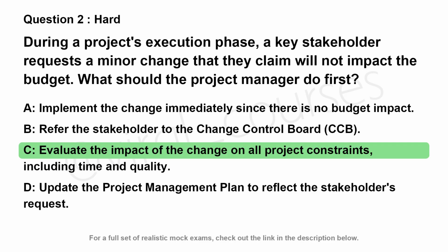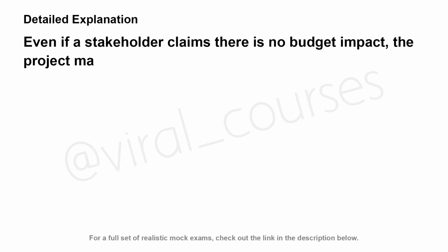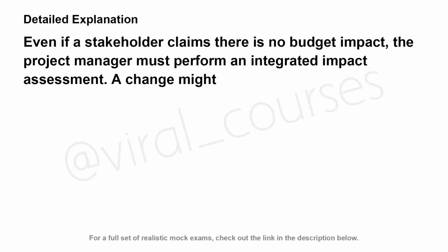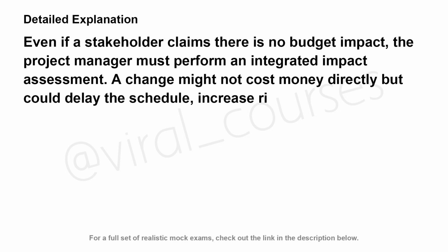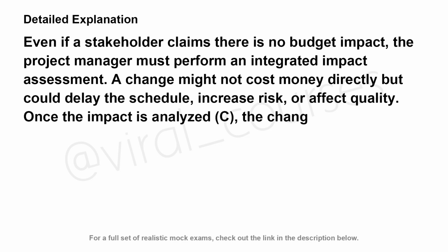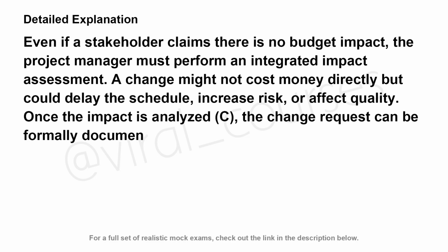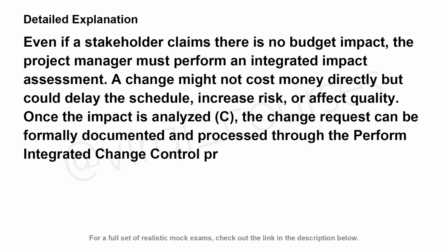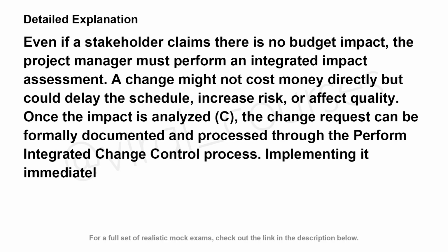The correct answer is C. Even if a stakeholder claims there is no budget impact, the project manager must perform an integrated impact assessment. A change might not cost money directly but could delay the schedule, increase risk, or affect quality. Once the impact is analyzed, the change request can be formally documented and processed through the Perform Integrated Change Control process. Implementing it immediately, A, leads to scope creep.